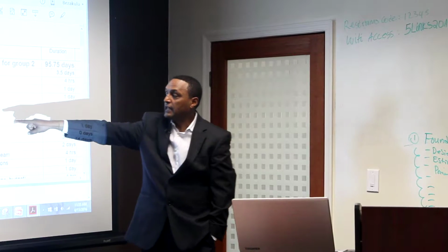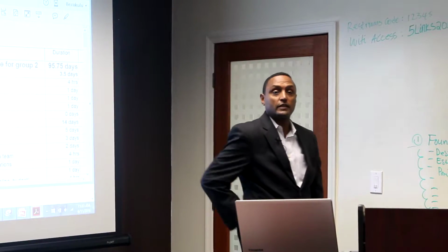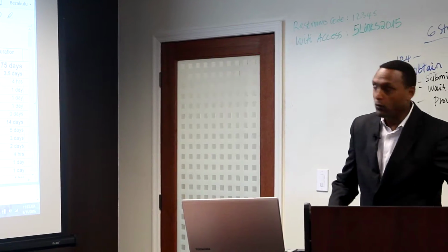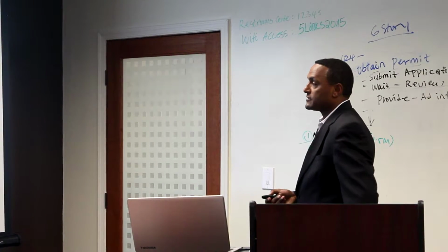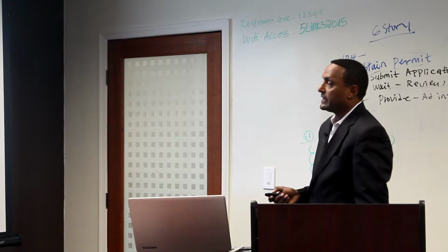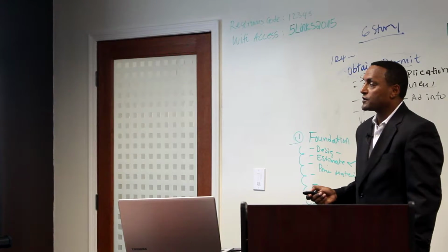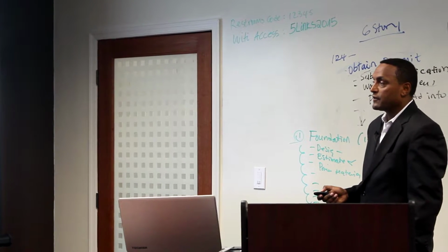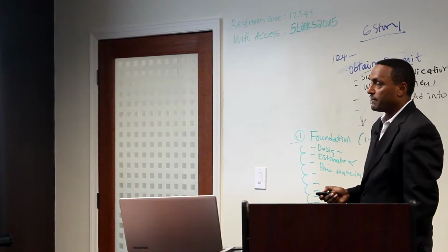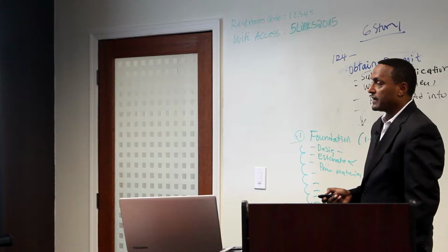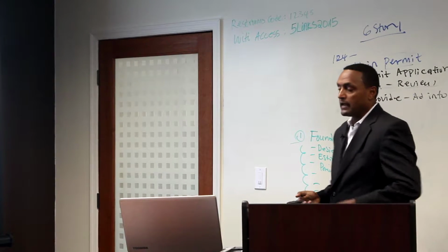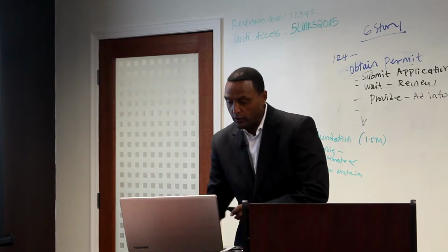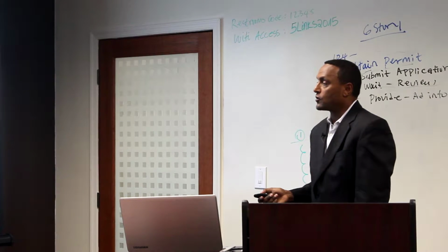I'm sure that analysis of my software requirement is going to take me 14 days. Out of those 14 days, I will conduct the need analysis, draft preliminary software specification, develop preliminary budgets, review the software specification package, incorporate feedback, develop the delivery timeline. It goes on and on and on. And when you are done, is analysis complete?